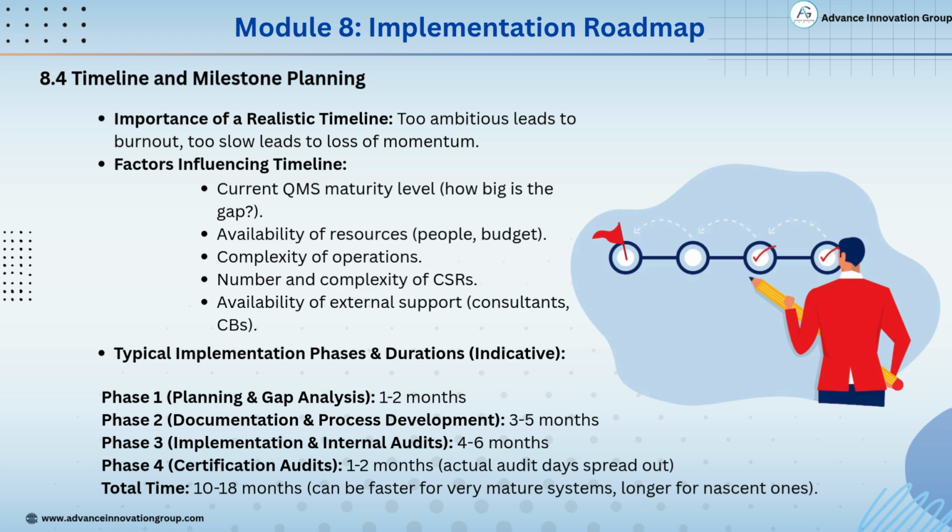Lastly, the availability of external support, like consultants or certification bodies, can speed things up or cause delays. The typical implementation timeline is divided into 4 phases. Phase 1, planning and gap analysis, 1 to 2 months.